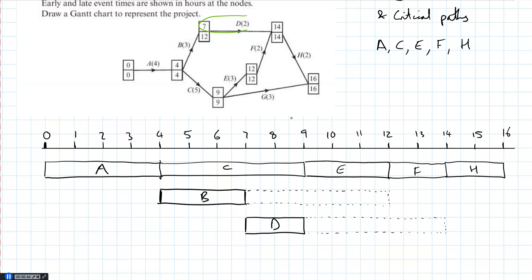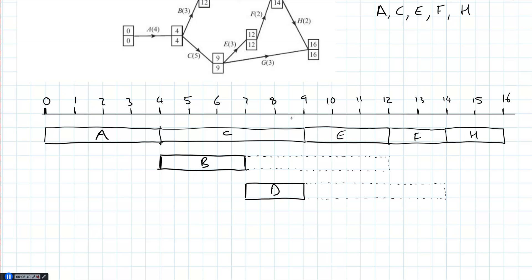And I would always try and pick the one with the earliest start time. The earlier the start time, the higher up it goes on my Gantt chart. So I wouldn't really, I'd try to avoid one starting here. It wouldn't be wrong, but I'd try to avoid that. If one started earlier, I'd put it here. And then I'd make sure D started after it. Try and get it so that we get this gradual kind of decrease, sloping like this. Try not to have it so it's kind of doing this. You should be all right in your exam, but it's avoidable. Always have it sloping down. Critical path is always at the very top.